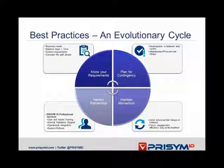However, as anyone who's ever been involved in an enterprise software solution rollout knows, things do not always go to plan and follow the happy path. There are going to be issues encountered, whether during the development cycle, during the vendor-side validation cycle, or even in the customer-side validation process. Life science customers have an extensive list of internal requirements and protocols for satisfying quality control, and those can be lengthy and time-consuming. Therefore, when you're planning out your implementation timeline, you need to allow for the unexpected. If you don't, you will immediately fall behind the second you encounter a challenge, whether in the software itself, its deployment, or even infrastructure and procurement delays.